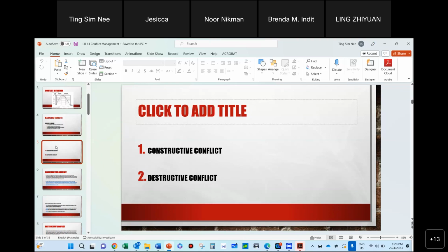The first buffer is the project team, to buffer all this conflict, to temper it down, to dilute it, to a point where it's not going to go into a very, very big war zone sort of thing. So that peacemaker has to come from the engineer themselves, actually. In fact, you will see in a lot of contracts that for disputes, the first layer is to refer to the SO. The SO themselves, or the engineer, or the architect should be the first gate, the first goalkeeper, before the conflict gets escalated into a dispute.